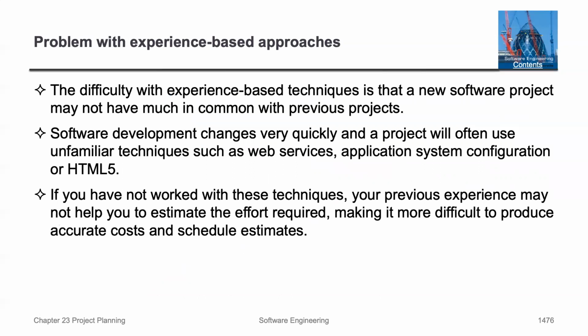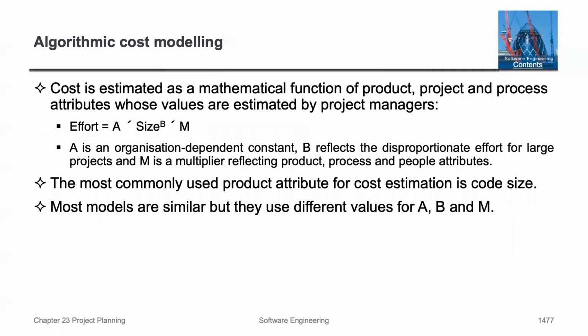The difficulty is that in a new software project, there may not be much in common with previous projects. Software development changes very quickly, and a project will often use unfamiliar techniques such as web services and other things. If you have not worked with these techniques, your previous experience may not help to estimate the effort required.